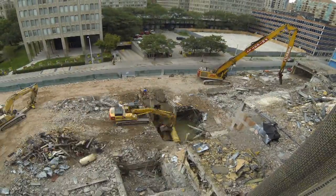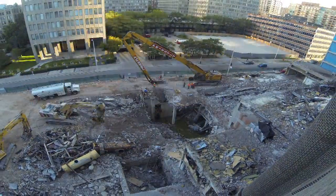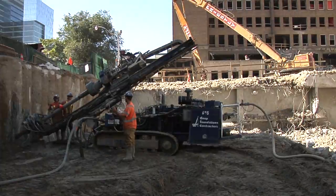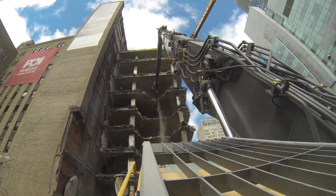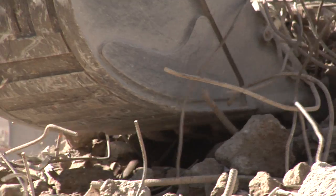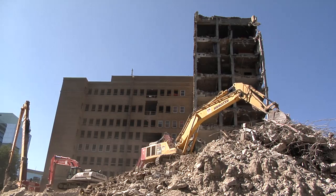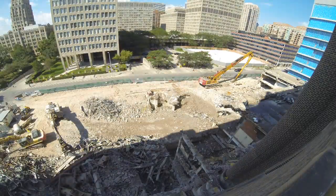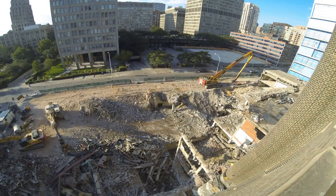Excavation is going to proceed, so really this starts to become off the critical path as we push towards the west. We can get going with foundations, the tower crane can go up. Demolition's been very interesting. There's been an average of 60 to 70 guys a day. So it's kind of bittersweet to see them go, but it's good to get everybody off site and move on with the project.